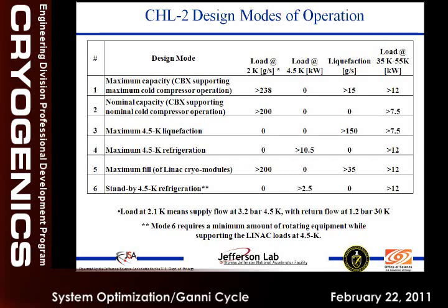So this is how we wrote our specification. We said we need to do 6 modes basically as a maximum capacity. And this is where we expect we're going to run at the 12 job case on a nominal. And this is when we want to run as a liquefier, as a refrigerator. This is when we have to fill after a trip.